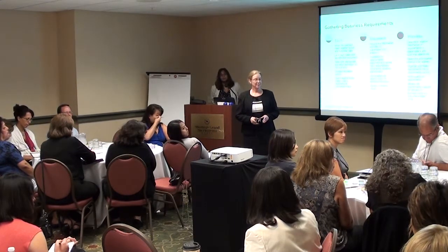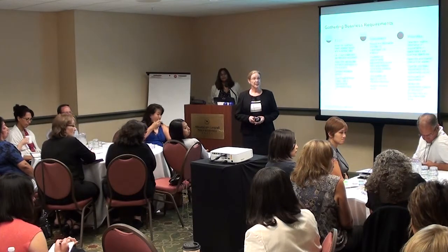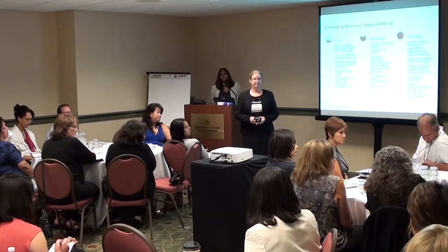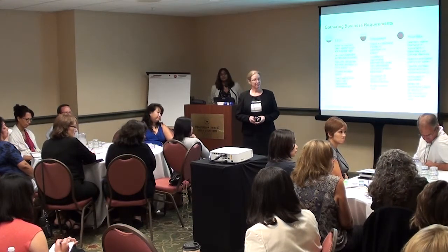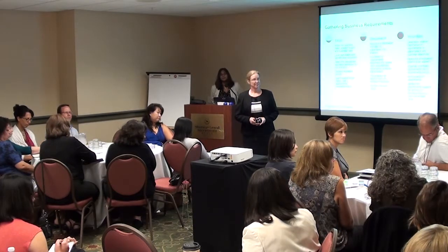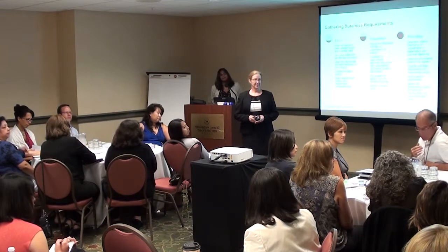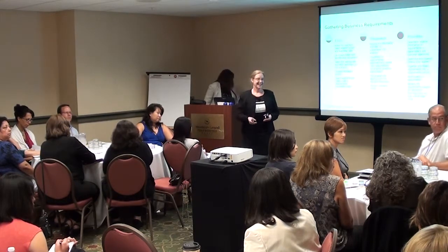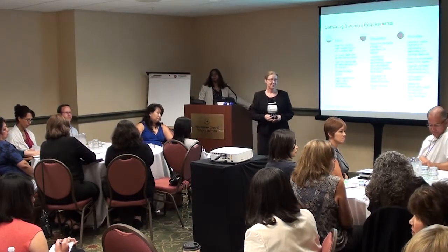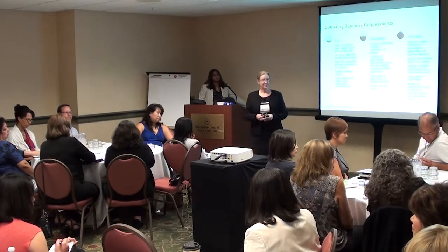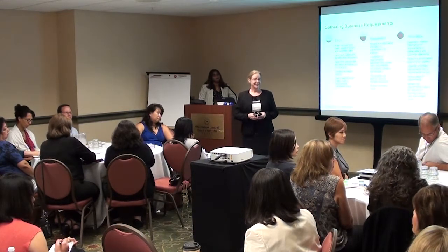In software, you actually don't know all the time what you want until you see something and you start playing with it. So Agile builds in the idea that scope creep is going to happen. The difference is you've got to have an organization behind you that is willing to accept some of that. And correct, prioritize: is schedule more important, is the cost more important, or is the scope more important?